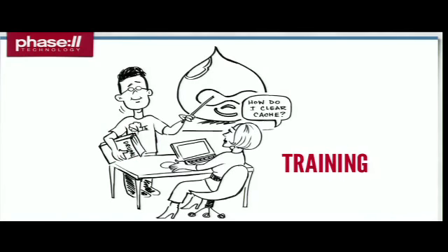This is not an official statistic, but I'd say over the last 10 years, we've launched literally thousands of Drupal sites. And I'd say maybe somewhere between 60 and 70% of our launches are pushed back by the client. I remind my team of that all the time, not because I want them to slack on the deadline, but because I want them to pay attention to that last slide: don't compromise your quality to meet a deadline that the client's going to move anyway. Do a good job, and if you end up going live that day, you're going to be happy for it. If it ends up getting pushed, you're going to be glad that you didn't cut corners to hit a deadline that didn't happen.